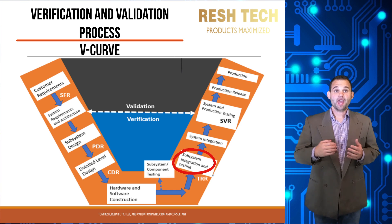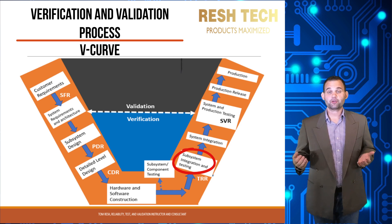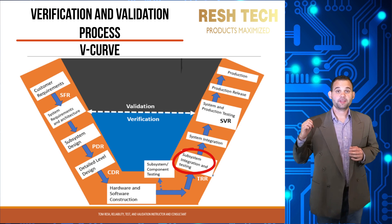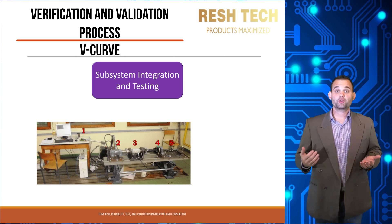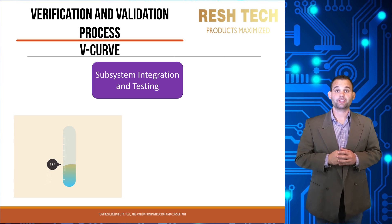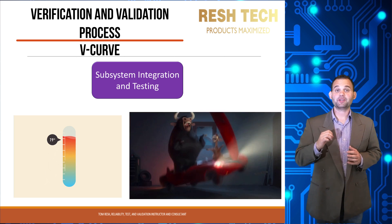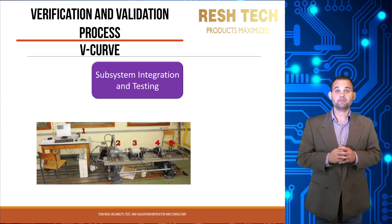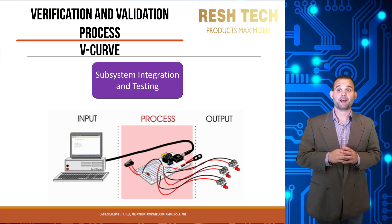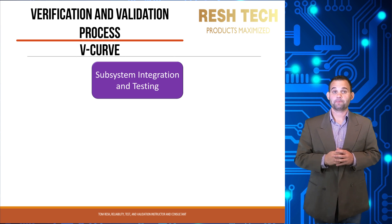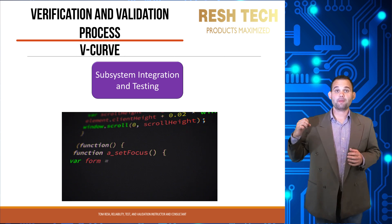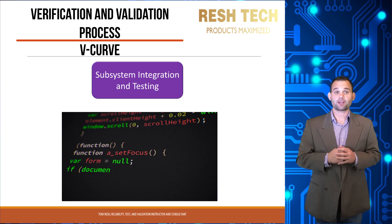The first right-hand step is subsystem integration and testing, where components are integrated together to form a subsystem. This typically starts as bench testing and progresses into temperature or vibration testing depending on the application. Verification engineers verify that the subsystem meets design requirements — for example, for an electronic subsystem, outputs or signals are checked against expected values in the system requirements document. Similarly, software engineers verify that software components operate as intended per system requirements when integrated into software modules.